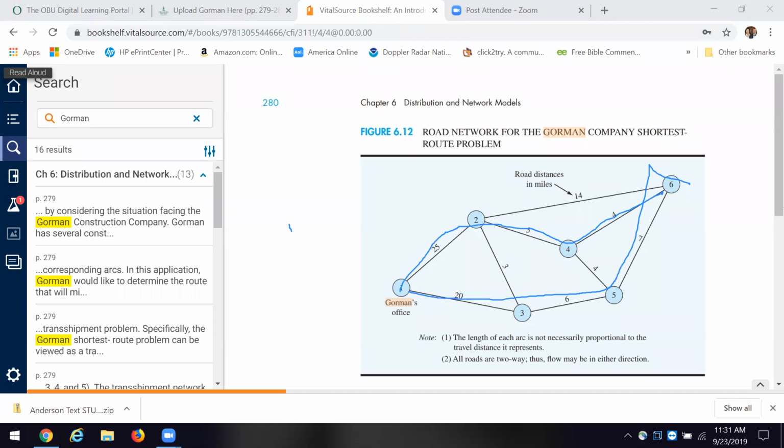You can see they're pretty close in terms of the critical route, the longest route. And then I've got some slack here, it would appear, but it's not really. This is 25. That's 39. So if I was after the critical path, I'd say it's node 1 to 2 to 6. Follow me? Because that's the highest value.